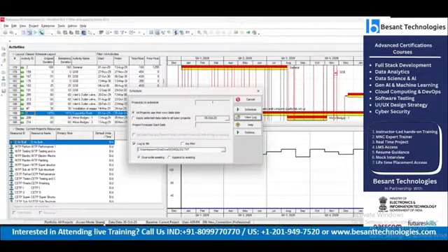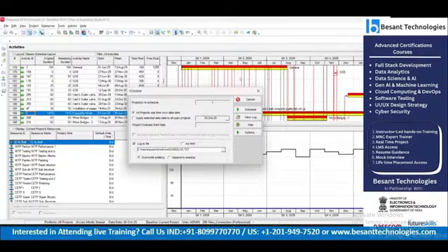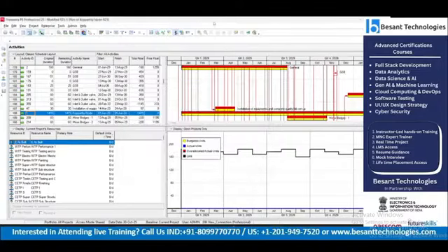Clear? Okay. So in order to run the log file, just click this icon and map a location here. Just map any location and automatically the log file will open. Only one restriction: you should run the schedule at least once. Then only the log file will open. Clear? Okay. So this is about scheduling. We have learned about scheduling as well. So I request you to share your screen and run the schedule and the log file in your system.